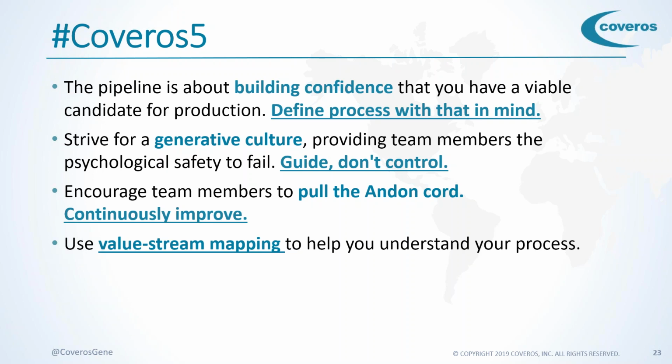Using value stream mapping to help you understand your process is important because that's telling you what your process is. One of the things I like doing when people take the FDO course or do this as a workshop is to tell them to take their value stream back to their office and put it up on the wall, or put it on a wiki if they're remote, and keep it up to date. Because what you'll start finding is, as the team starts looking at it and talking about it and actually doing the work, you'll start noticing you missed pieces, or that some of your estimates of the amount of waste time and work time are off. And you can start refining it and do a much better job of identifying where your roadblocks are and what the impediments are.